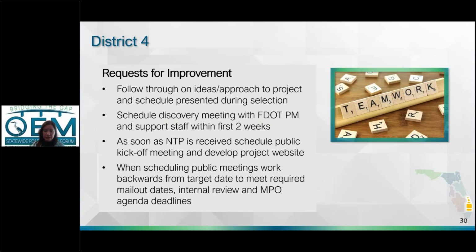As soon as the notice to proceed is received, schedule the public kickoff meeting and develop the project website. That's another area for improvement. We have found that sometimes a few months go by and we don't have a project website. We want the project website to be the first thing developed, and then schedule the kickoff meeting and work backwards from the kickoff meeting.